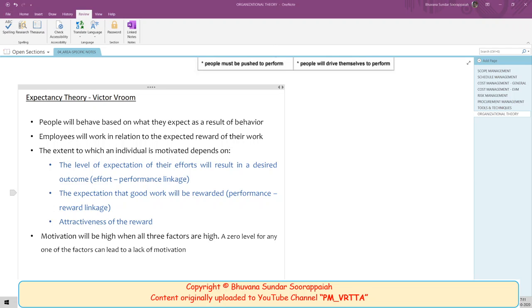Usually they say performance is proportional to the reward. Now the theory also says your reward also has to be proportional. I told you, after giving your everything at the cost of your personal life, sacrificing it and everything, all you get is an Amazon voucher of 1000 rupees. When someone else gets a promotion, that is not a reward. Rewards and recognition must be commensurate with the effort and outcome. And it must not be a zero-sum game. Zero-sum game means I can only win if you lose.